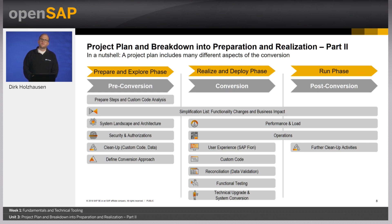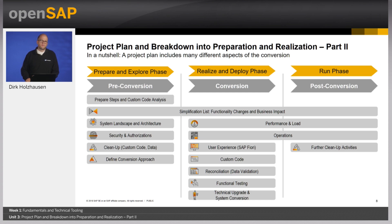The conversion to S4HANA includes many different aspects that need to be considered in the project phases. Aspects that need to be executed before the conversion starts must be considered in the prepare and explore phase. These include: custom code analysis, assessing the impact of the Simplification List, defining and preparing the system landscape and architecture (including the architecture required for Fiori), security and authorization, cleanup and archiving activities for custom code and data, and defining the appropriate conversion approach including the number of conversion cycles.